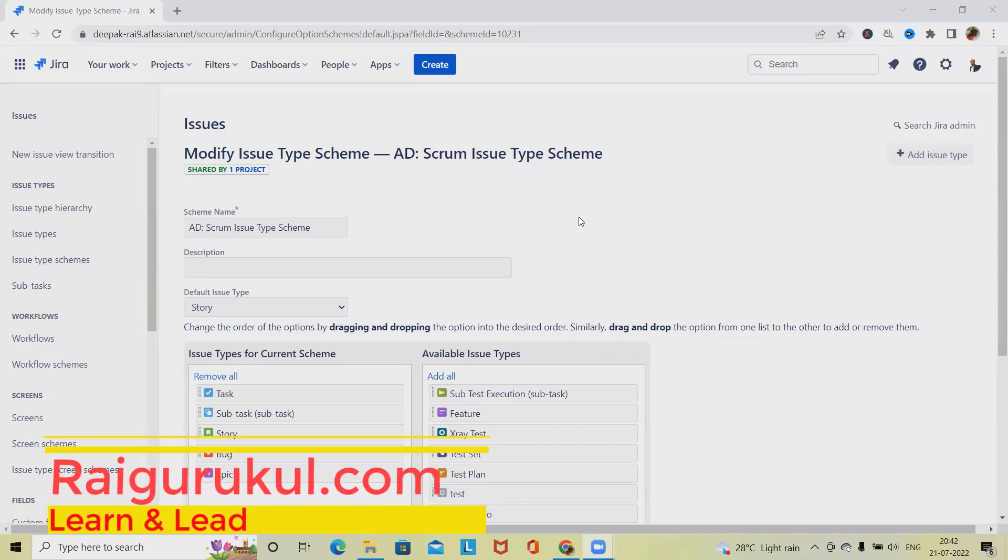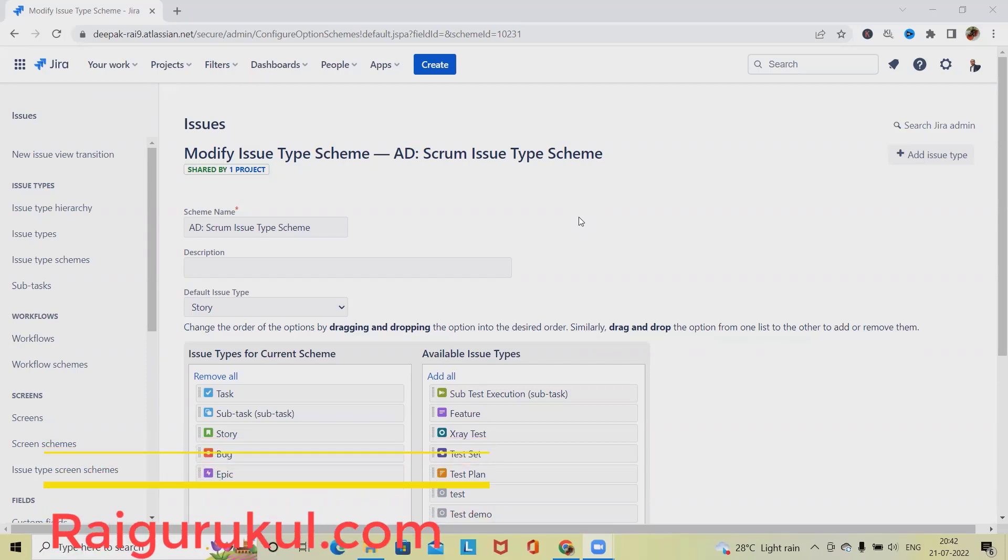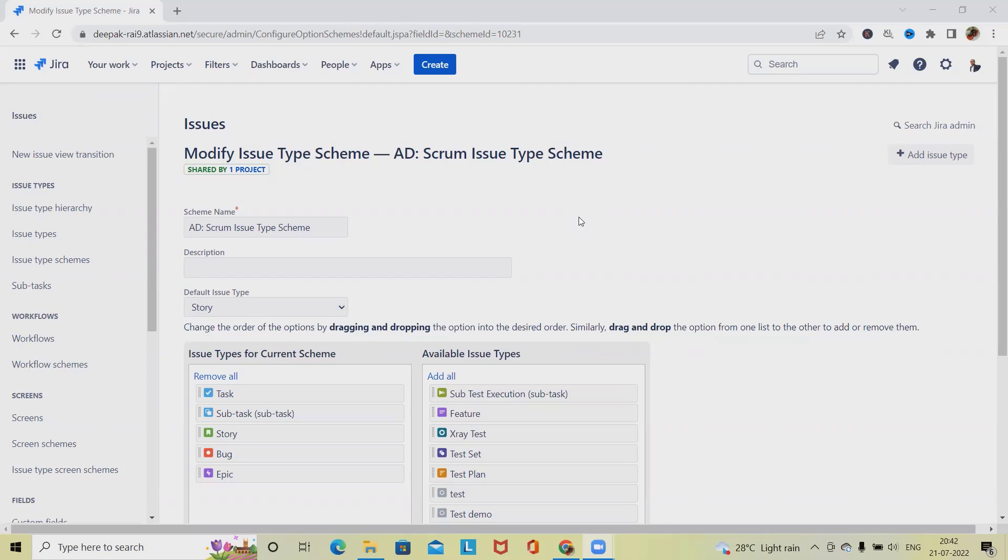Welcome to rykerkul.com. In this video we'll discuss how to create and configure Initiative in Jira. Initiative is a very large body of work which spans multiple epics and sometimes multiple teams. Initiatives can be renamed to match specific agile frameworks of an organization.